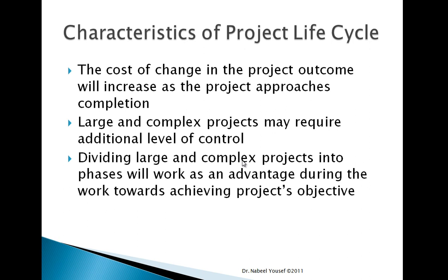For example, if we are building a house, at the beginning of the construction, we can say, can you just ignore one of the drywalls and let's make it a big open area, and then maybe the construction company will ignore one of the drywalls and not put any drywall or insulation or anything, while towards the end of the project they have to knock down that wall, and the waste of paint, labor, and other associated costs will be demolished with that wall.